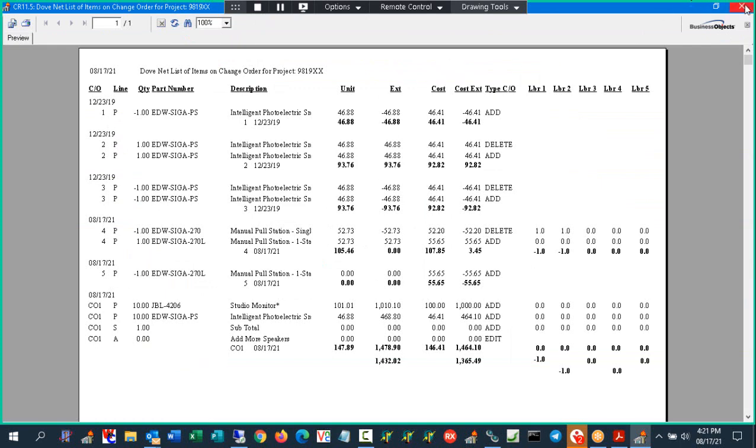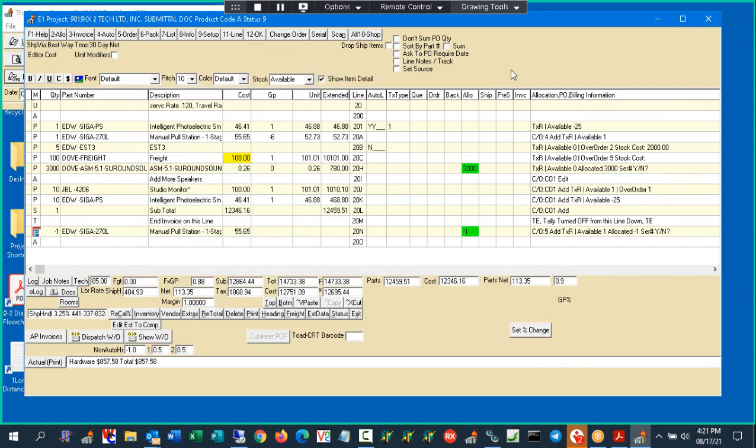Now, go ahead and ask your question again. Well, I think I know the answer, but if a check brings back 10 items from a project, the right thing to do would be to create a change order with that project and put in those part numbers as a separate change order, and then approve it, and then reallocate it, and then into inventory. That's correct. That's the exact example I just did.